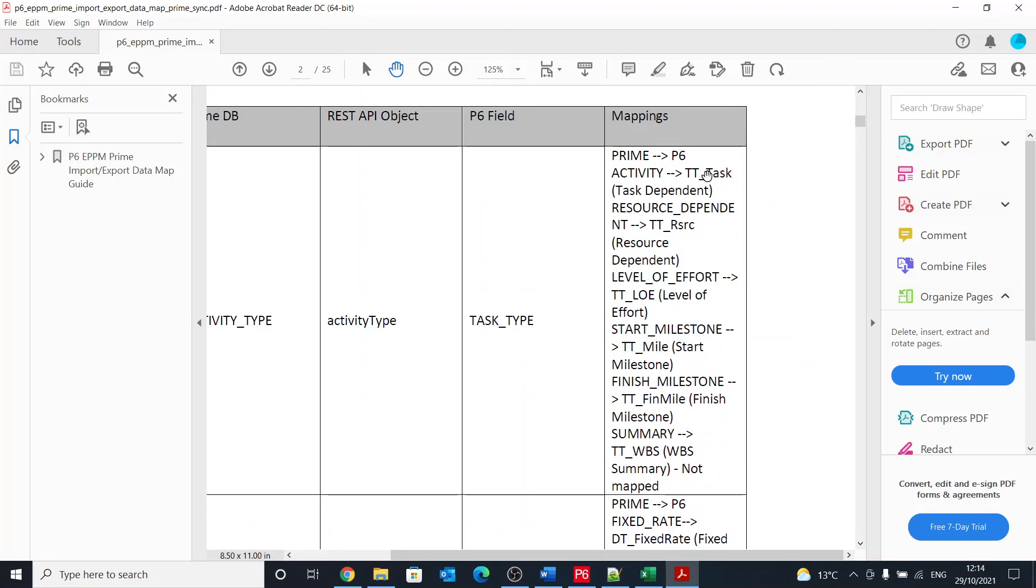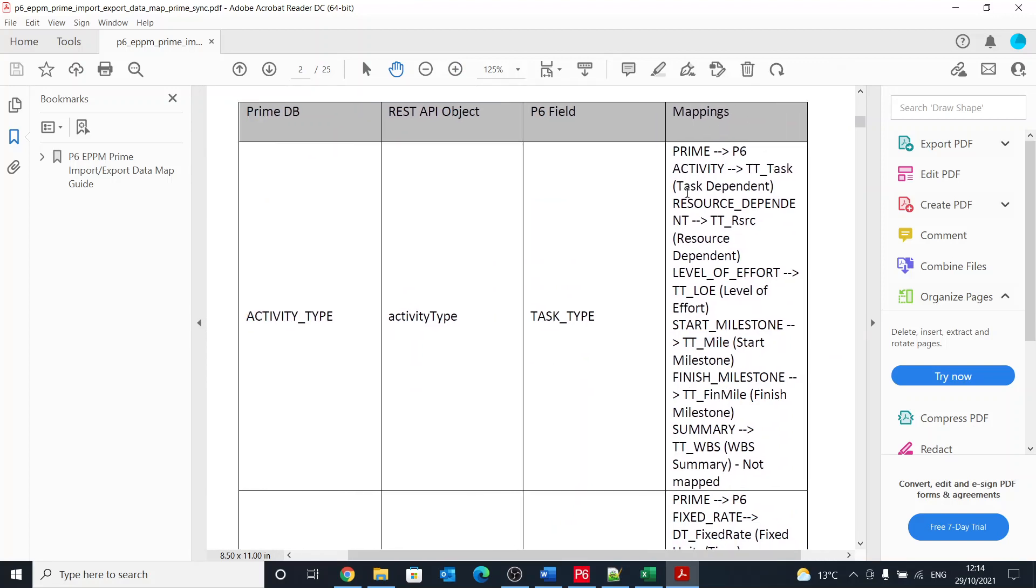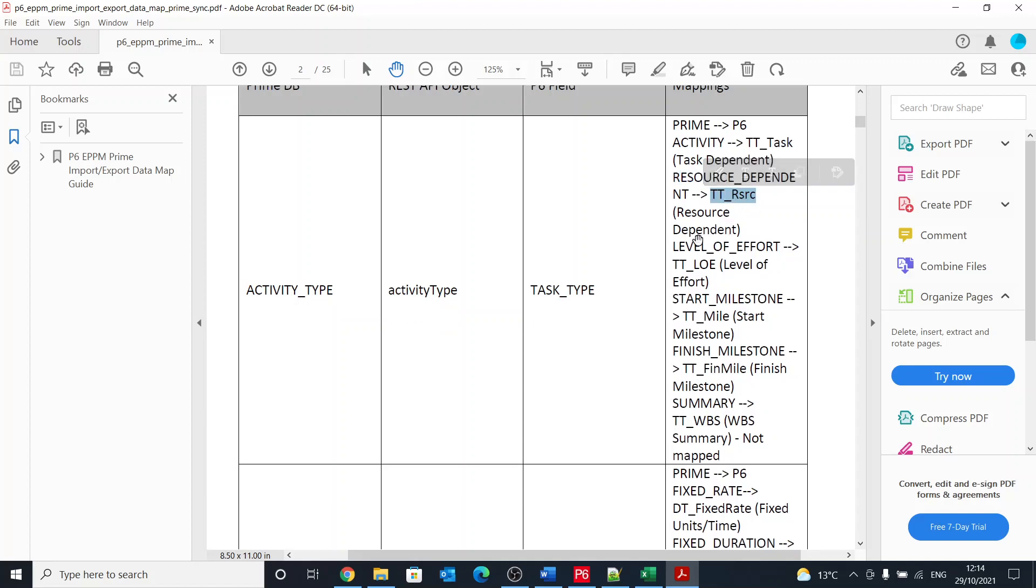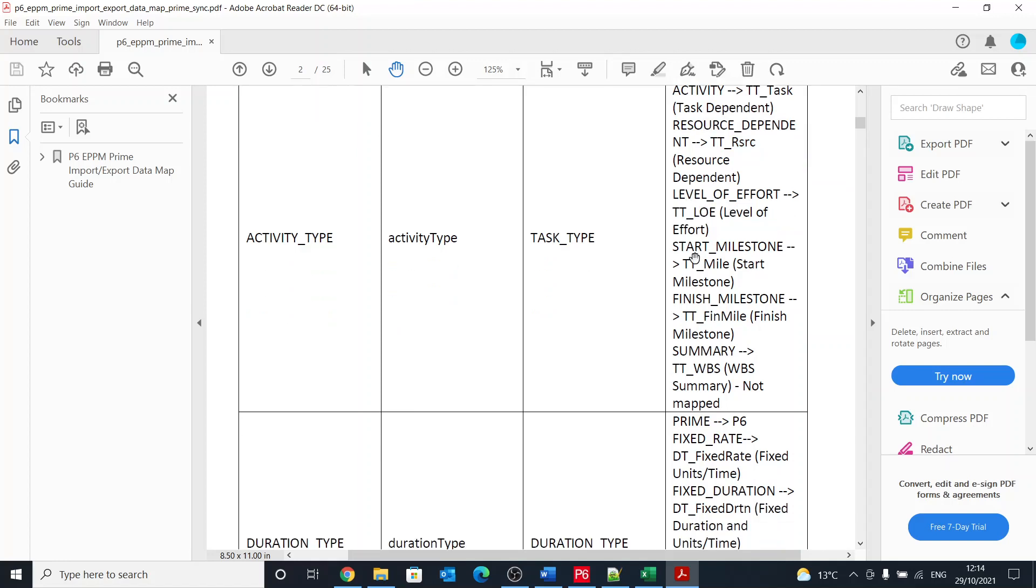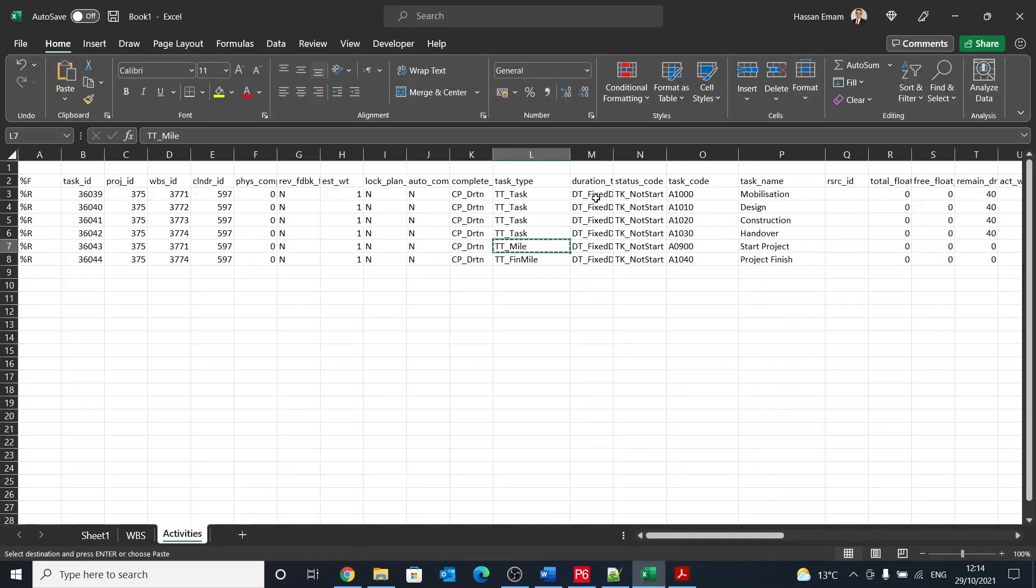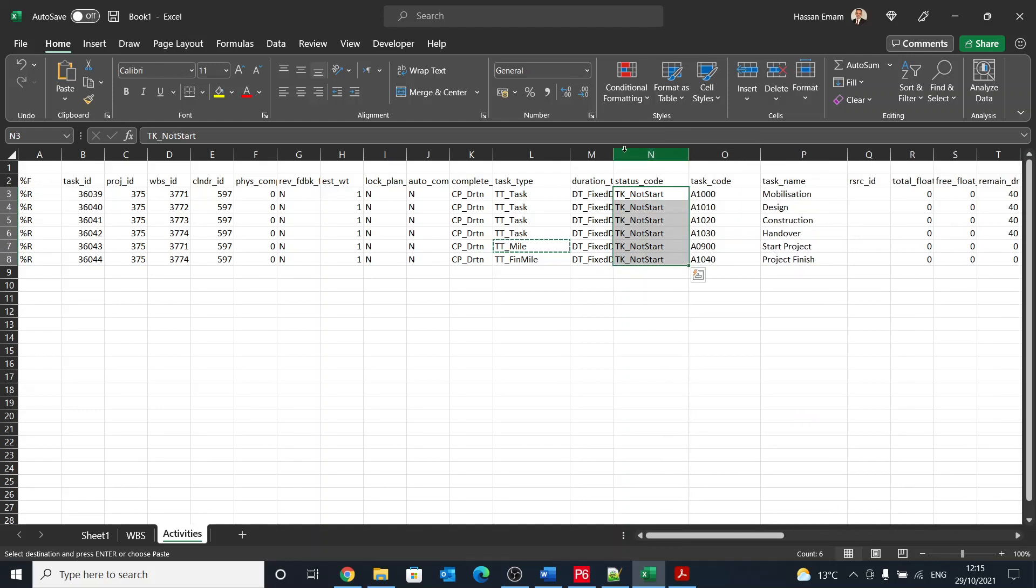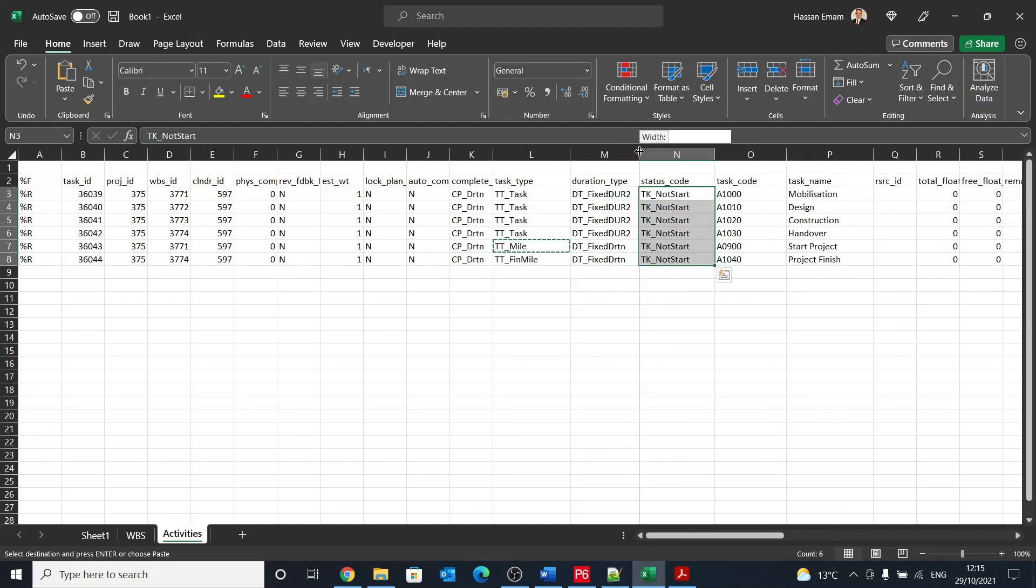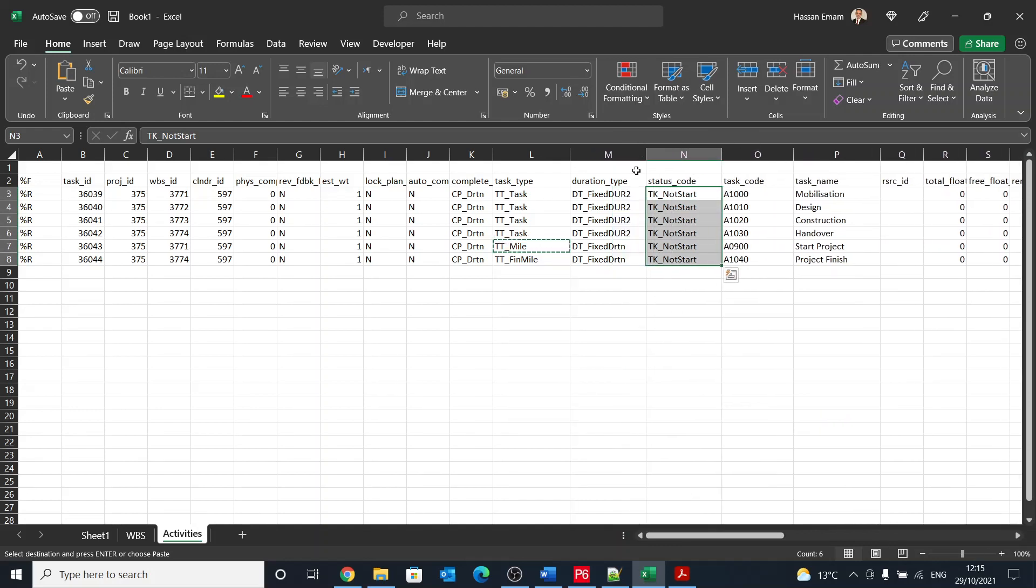We have TT_TASK task dependent, and then resource dependent is called TT_RSRC, level of effort is called TT_LOE, and so on and so forth. But that applies to all the variables that you don't understand, what are the meaning of these variables. So that can be a quite handy document to refer to every time you are trying to understand a Primavera file or XER file.